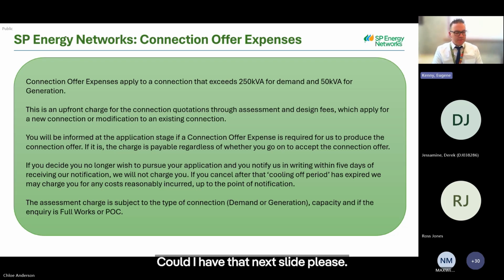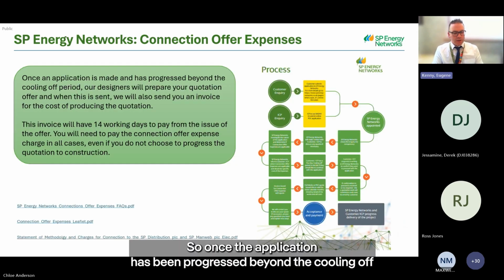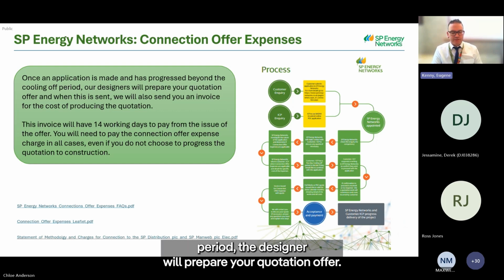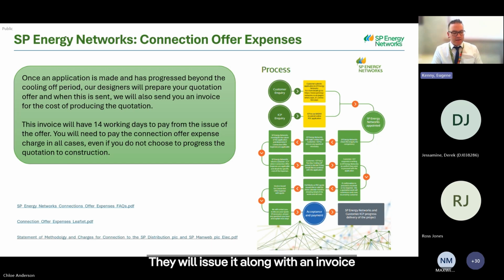Could I have the next slide, please? Once the application has progressed beyond the cooling off period, the designer will prepare your quotation offer. They will issue it along with an invoice for the design and assessment fees. You must pay the invoice within 14 days of issue, even if you do not proceed through to construction.